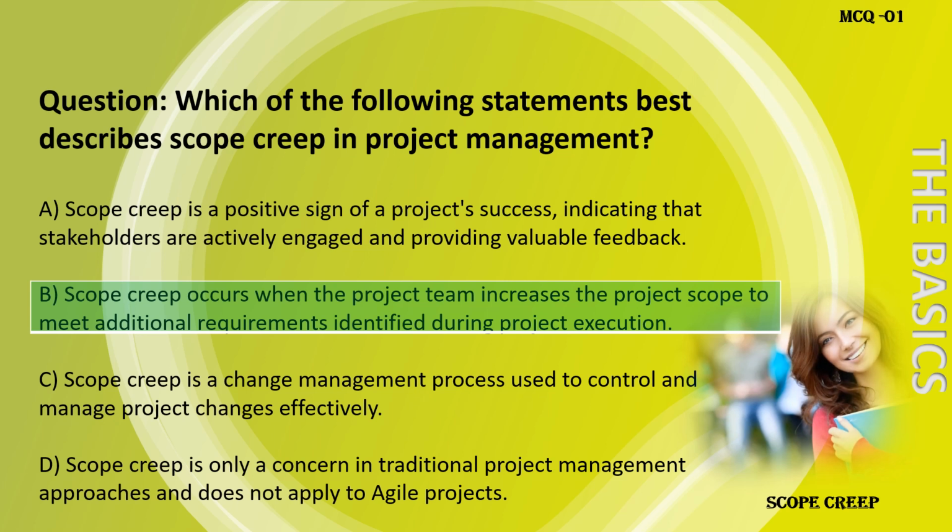Scope creep can lead to project delays, cost overruns, and challenges in meeting project objectives. Managing scope creep requires a robust change control process to assess and approve any changes to the project scope to ensure alignment with project goals and avoid unintended consequences.